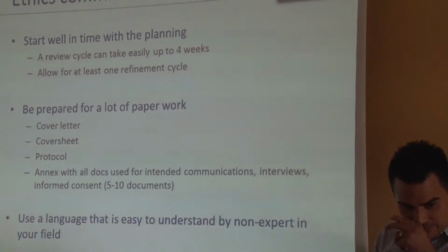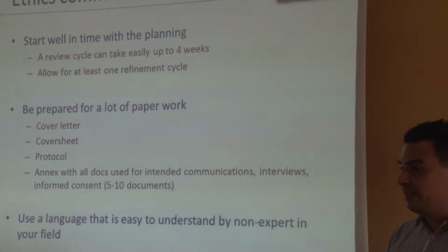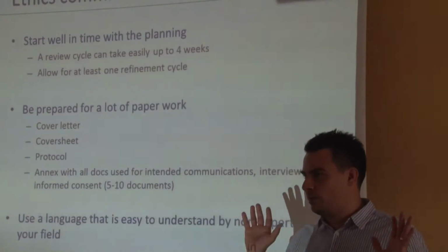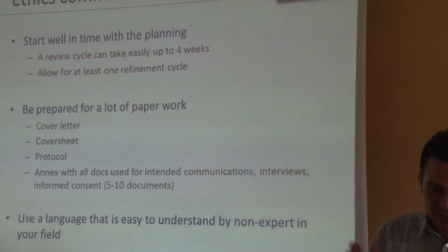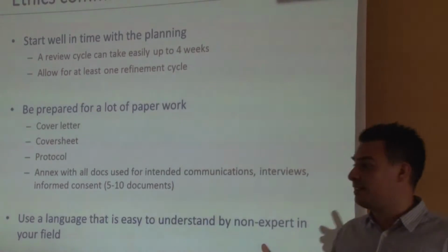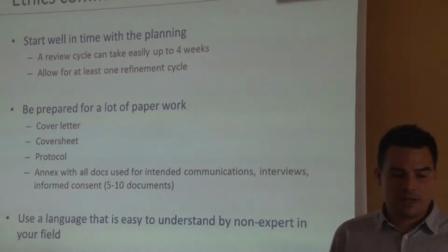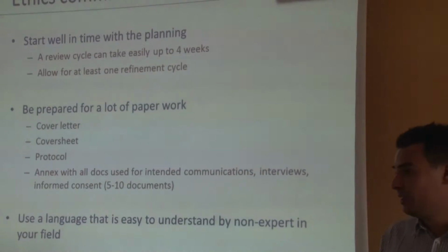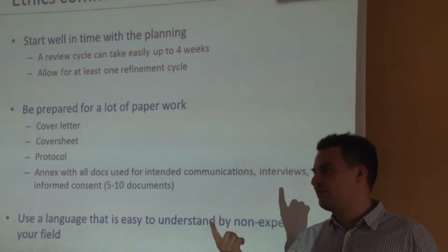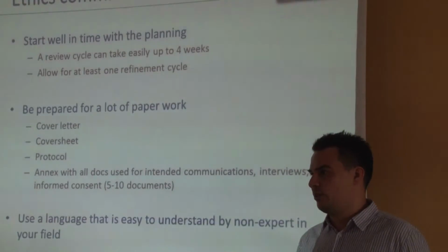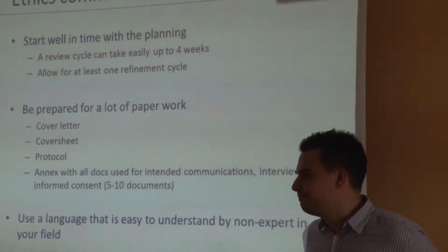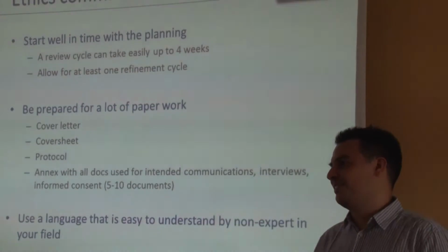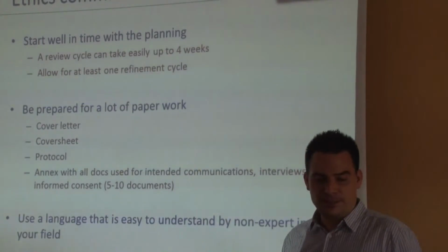Then, obviously, this means apart from designing your experiment, doing your code and whatever you want, so the parts that we discussed earlier, getting this approval is already a quite intensive process. So you will have to start well with the planning. You have to think of at least 4 weeks of a review cycle, so until you submit something and get back. These boards usually meet once a month. So that's why I say 4 weeks until the next time they can give you feedback.